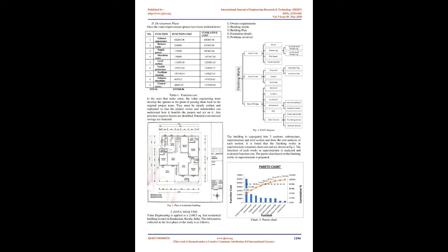Briefly, these phases are: A. Information phase. In this first phase, the team attempts to understand why the project exists and who or what it is to produce. They obtain project data, present the original design or product concepts, and understand the project scope.